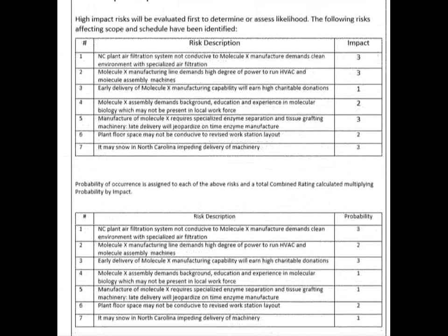So if we look at our risks, I've reviewed my risks, I've modified my risks, and I've applied a probability and impact rating. The impact being how severe would this be on the project. Probability, how likely is it on the project.